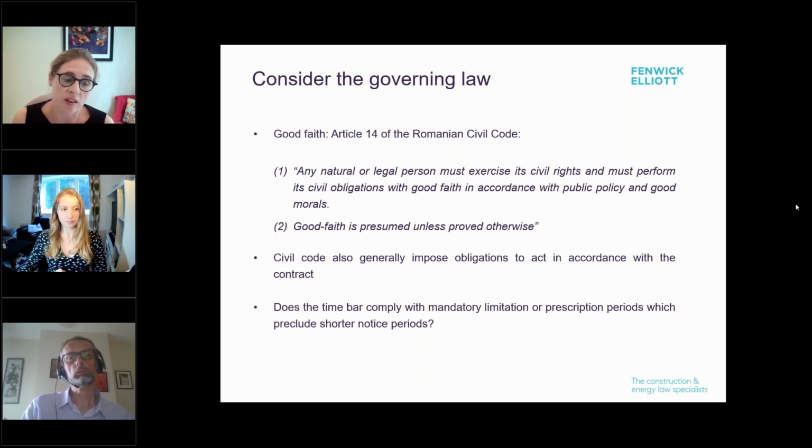Another thing to check is, does the time bar comply with any mandatory limitation or prescription periods, which may be a shorter or a longer period in the governing law. Always something to check in an international context.